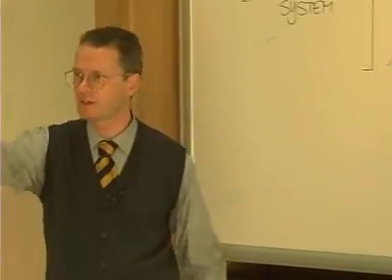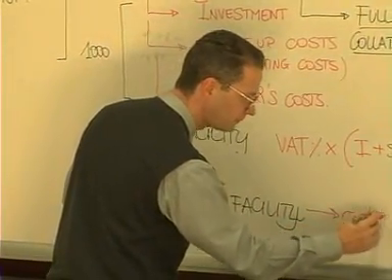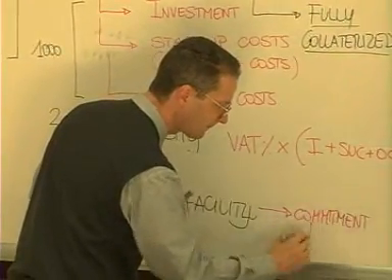A commitment fee. So, as long as a standby facility is not used, it is there, it is available, but you anyway have to pay a certain amount of money, given the fact that the banks have been open to provide you some form of safety cushion. And that safety cushion costs you a commitment fee. Okay? So here you don't have interest unless you use it, but you anyway have to pay a commitment fee. Sufficiently clear? Very easy.